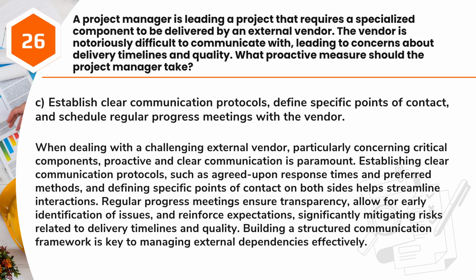Answer: C. Establish clear communication protocols, define specific points of contact, and schedule regular progress meetings with the vendor. When dealing with a challenging external vendor, particularly concerning critical components, proactive and clear communication is paramount. Establishing clear communication protocols, such as agreed-upon response times and preferred methods, and defining specific points of contact on both sides help streamline interactions. Regular progress meetings ensure transparency, allow for early identification of issues, and reinforce expectations, significantly mitigating risks related to delivery timelines and quality.